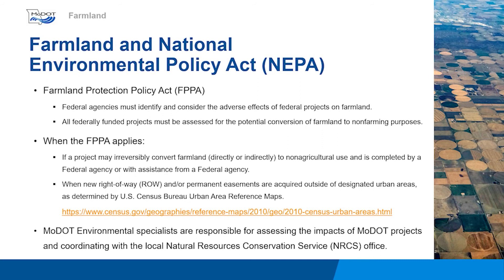The Farmland Protection Policy Act requires that federal agencies identify and consider adverse effects to farmland that have resulted from projects that involve federal participation. For most projects, the federal participation is federal funding. When a MoDOT project has new right-of-way and/or permanent easements that result in converting farmland to another land use, coordination with a local National Resources Conservation Service, or NRCS, office is required.